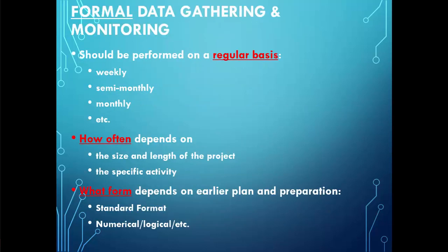The formal data gathering should be performed on a regular basis, such as weekly, semi-monthly, monthly, and so on. In short projects, data collection can be performed every week, while in long projects it could be every month, and it will also depend on the type of the project that we are dealing with.